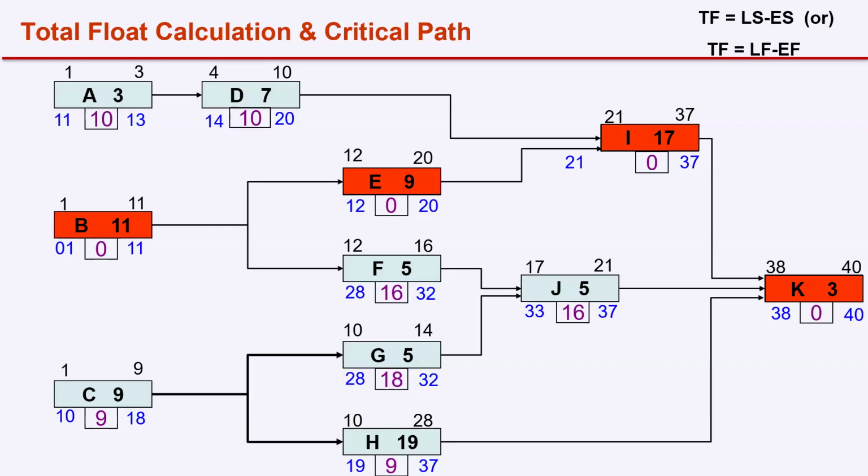Name of the document. So I said, at the beginning of this project, it was told to finish this project in 50 days. In which document will you have this? Very good. No, not the schedule management plan, the project charter. Right answer is project charter. High level duration, overall duration of the project is in the project charter. At the beginning of the project, we agreed we can finish this in 50 days and that is the duration mentioned in the project charter.